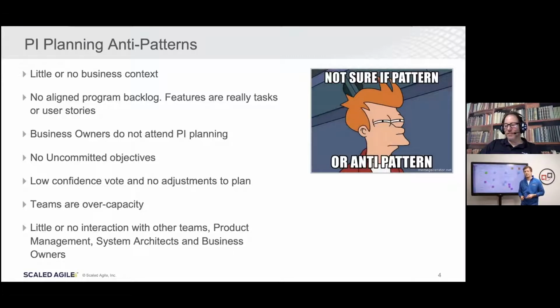The second point is you need to think about your communication channels. You need to understand each other, you need to see each other. So don't go into a PI planning without having your video cameras on. Then there are channels like chats. The Scrum Masters together with RTEs have a chat, the team has a chat, product owners with product management have a chat. And the fourth part of communication is obviously a real-time synchronized board. Somehow we need to make sure that our plan is transparent across all the locations people are sitting, whether that is in an office or at home.